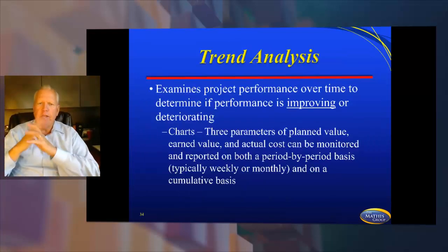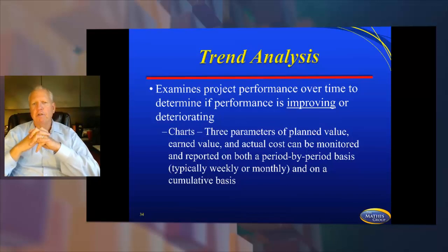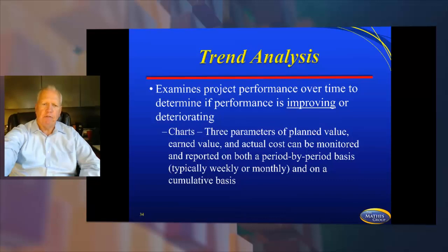Trend analysis examines project performance over time to determine if performance is improving or deteriorating. Charts: the 3 parameters of planned value, earned value, and actual cost can be monitored and reported on both a period-by-period basis, typically weekly or monthly, and on a cumulative basis.